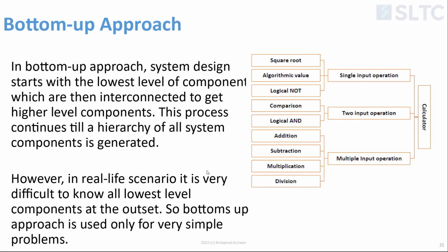But the way we built it was from bottom up. First, we wrote down all the features we wanted. Then we started grouping them, and then we connected them together. So this is called the bottom up approach.